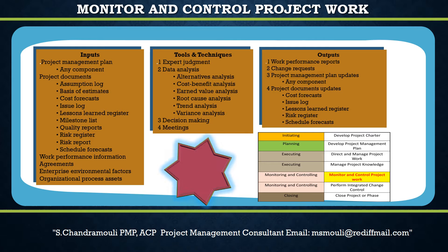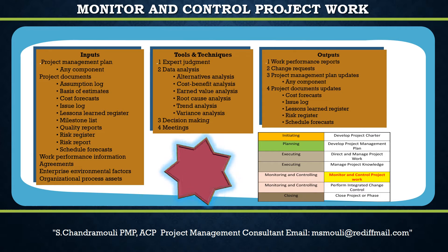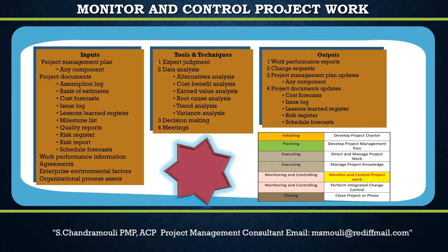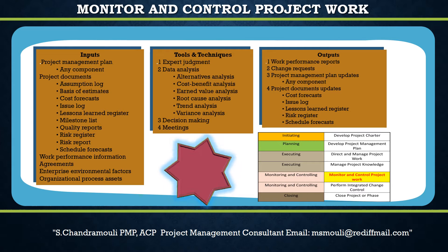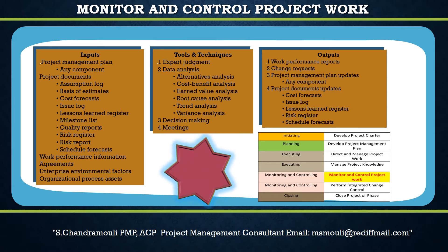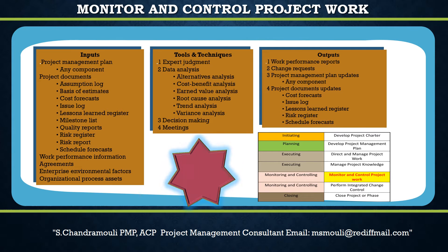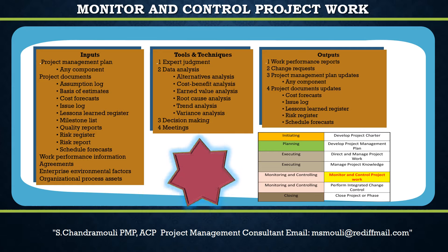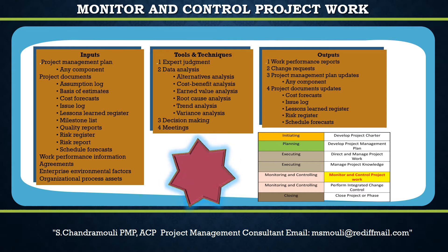Four, maintaining an accurate, timely information base concerning the project's products and their associated documentation through project completion. Five, providing information to support status reporting, progress measurement, and forecasting. Six, providing forecasts to update current cost and current schedule information. Seven, monitoring implementation of approved changes when and as they occur. The key benefit of this process is that it allows stakeholders to understand the current state of the project and budget, schedule, and scope forecasts.